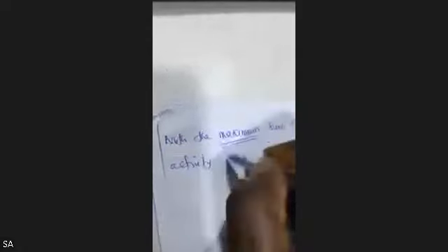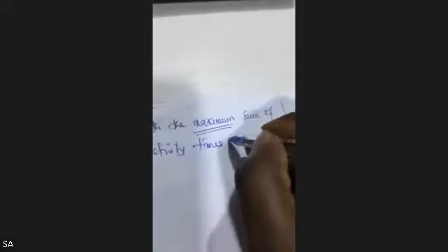and then selecting the parts. Please pay attention to this part too. And then select the parts, selecting the parts with the maximum sum of activity times on that part.